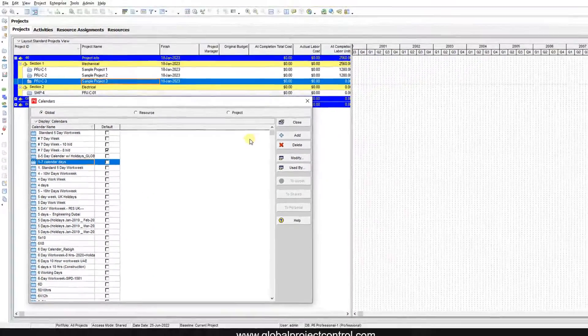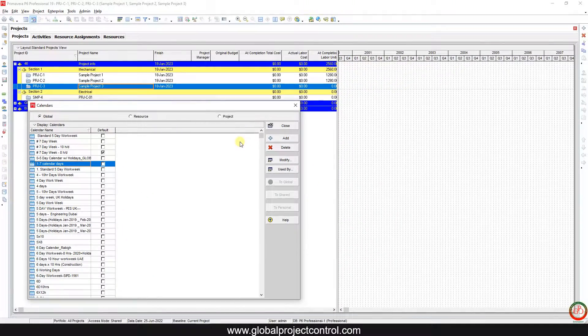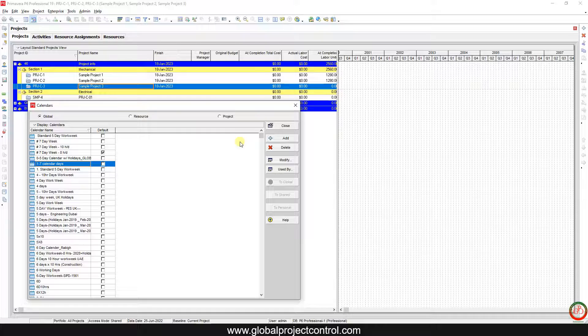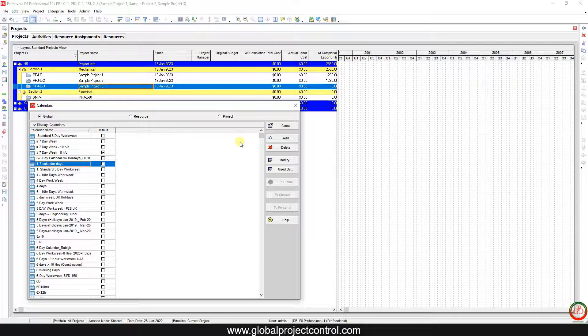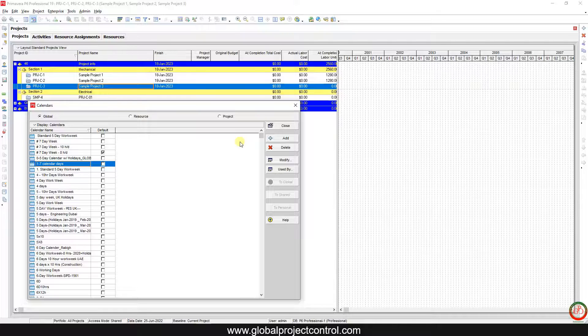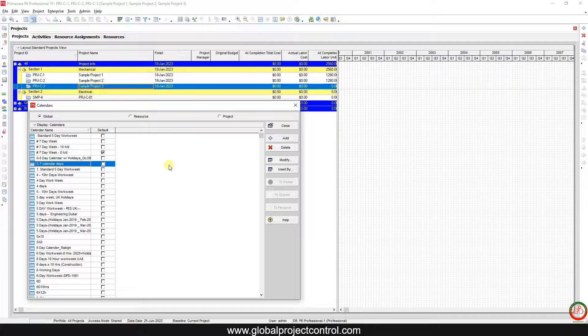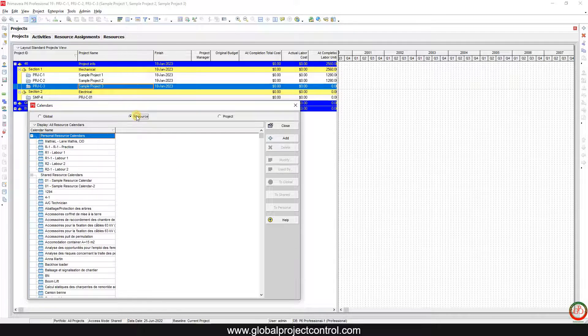So if you want to remove one of your calendars, maybe after working with your database you face several calendars you cannot remove. You cannot remove all of them; you should merge them. This is how you can merge your calendars. But we have the same problem over the resources.